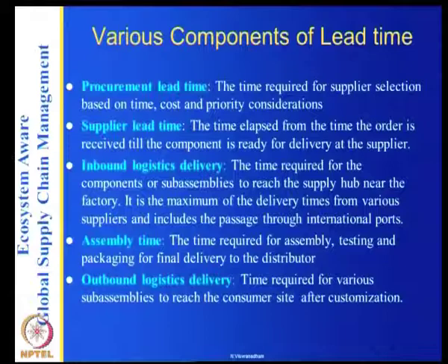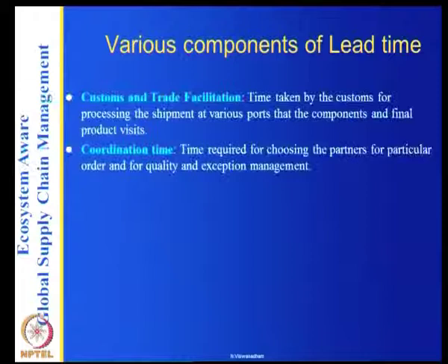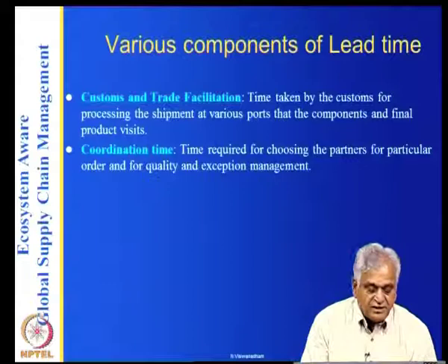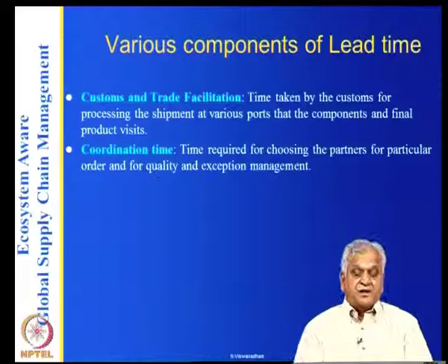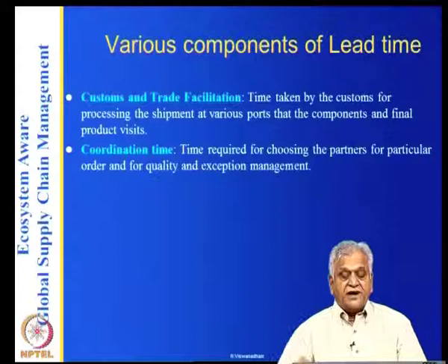The other two components are the customs and trade facilitation, the time taken by the customs for processing the shipment at various ports that the components and final product visit. And there is, of course, the coordination time required for choosing the partners for a particular order and quantity, quality and exception management. Well, these are basically the seven components of the lead time, and you have to add all this together.